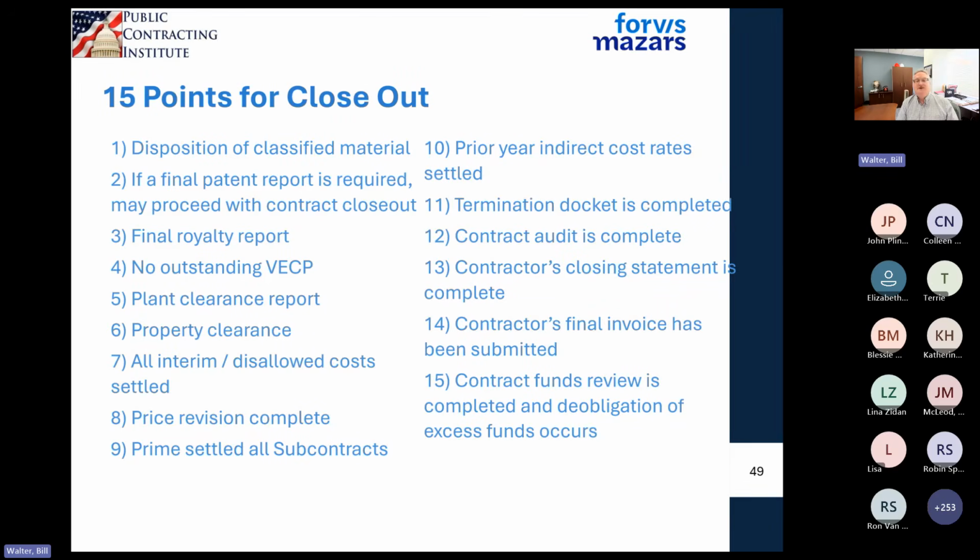So as a result of that, there's a specific exemption within the FAR that says if you're simply trying to request more money under a cost type contract, it's not going to be subject to TINA, but it will be subject to final closeout, audit, all of these other requirements.